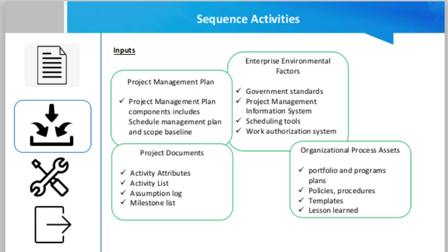The attributes of the activities chosen by you provide additional insight into the activities that need to be addressed before others. Additionally, the milestone list offers you the key milestones which might influence the overall order of all activities. The project scope statement goes a long way in ensuring that nothing goes missing. More often than not, it influences the activity performance order.